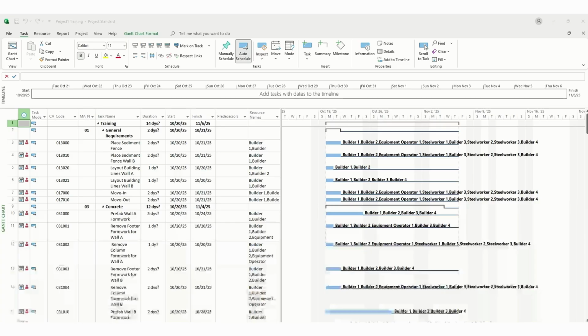that you could fill out: who it was conducted by, the date, the differences that you observed, all the other different things you would need, plan, specs, BOM for this page, and then other things you would need, copies, any permits, outages, any other permits, if this was a project that already started, what's in CONUS, what's local, any other special requirements that you may